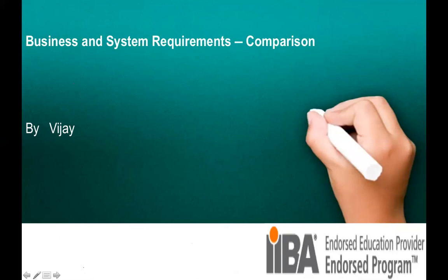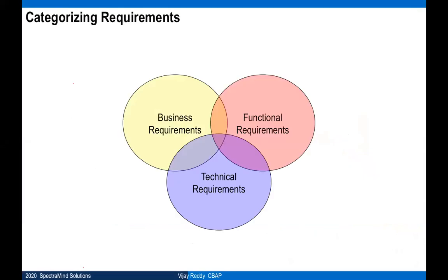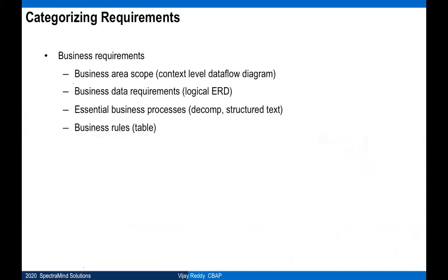So it is the man-hours spent on that particular project. Therefore, if there are 3 or fewer people, it's a small project. Approximately 3 to 9 people, it is a medium project. More than 9 people working on the project, it is a complex project.